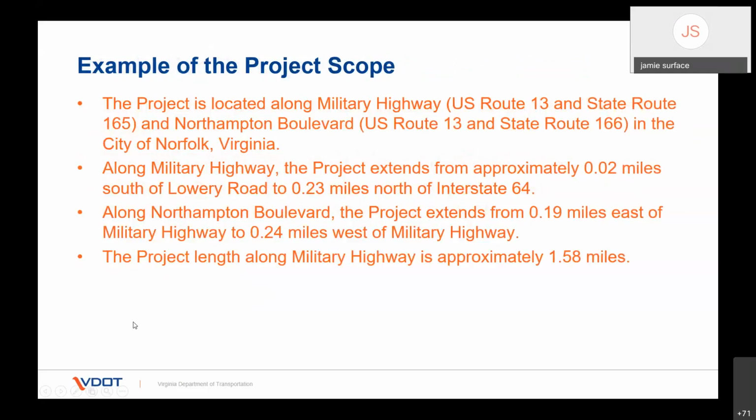Hey, good morning. A couple things I want to talk about on these previous slides. As you're gathering the information on your project, please remember that you may not go onto railroad right-of-way for survey or for any other type of purpose without a right of entry from the railroad. They typically construe that as trespassing if you do, unless you're at an established crossing. So just keep that in mind, and we'll go into that a little bit later as well.